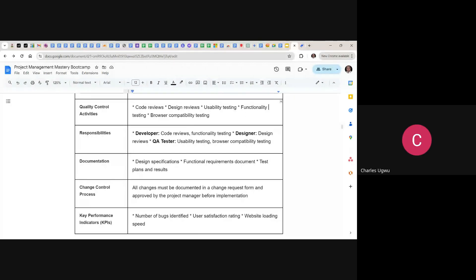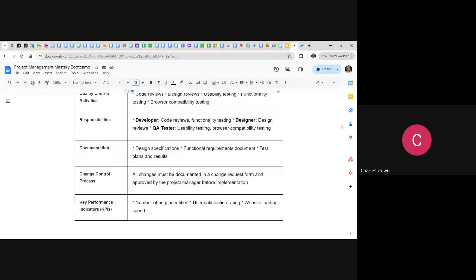Here you can see what the developer needs to do: code review and functionality testing. The designer needs to do the design review. The quality assurance analyst or tester needs to handle usability testing and browser compatibility testing. Then for documentation: design specification, functional requirements document, and test plan and test results.